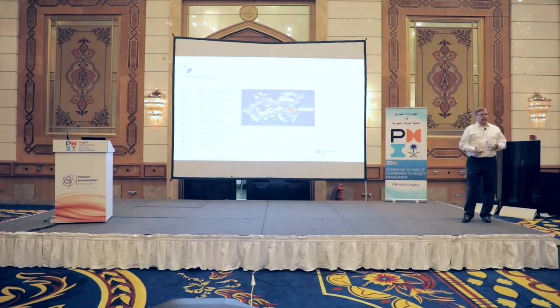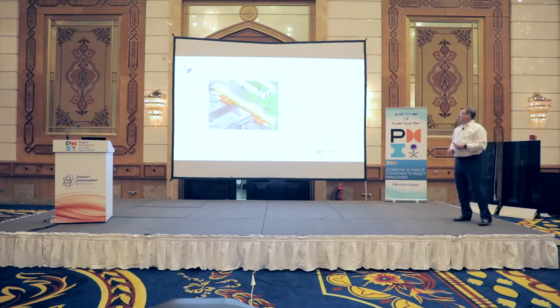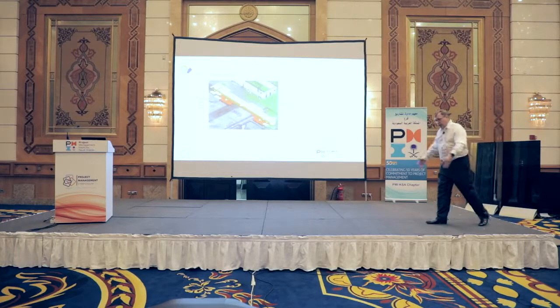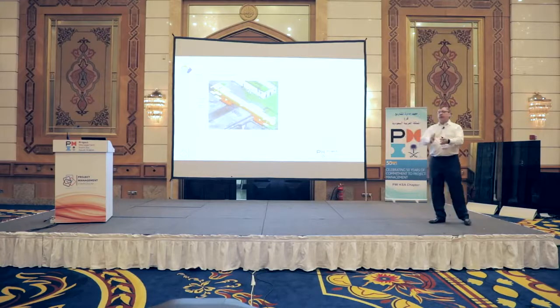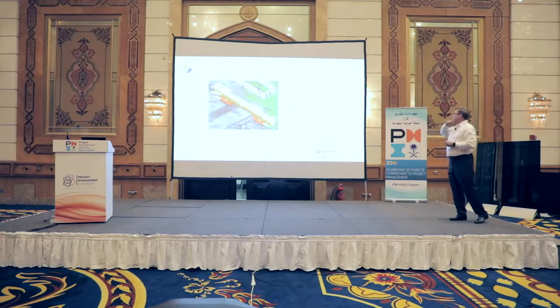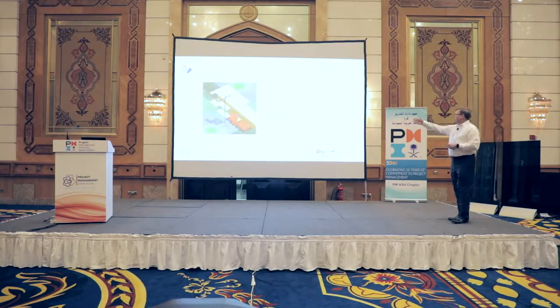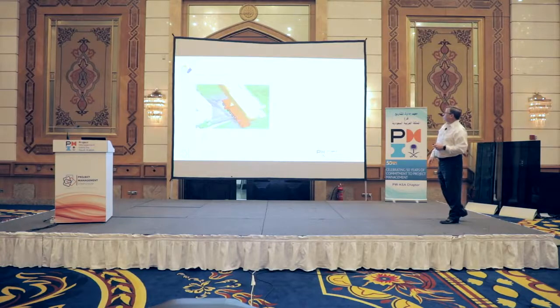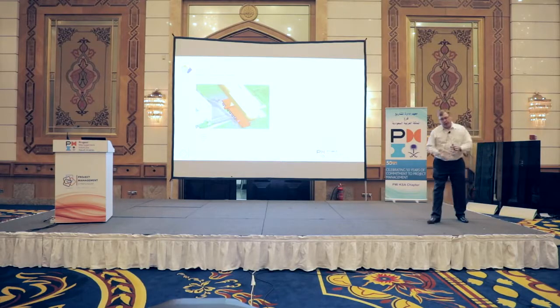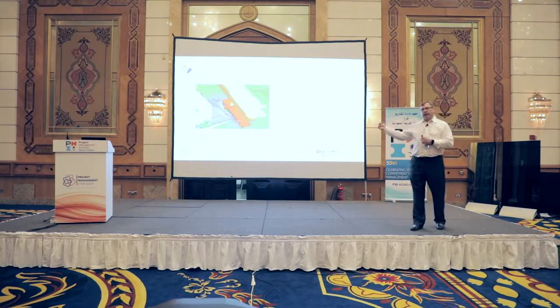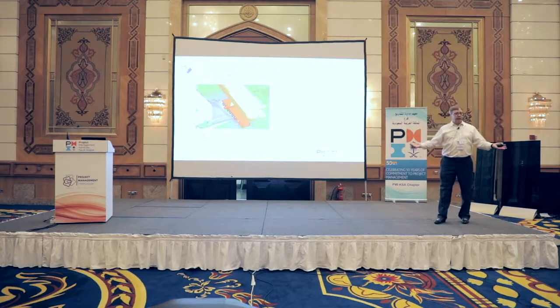Then there are the soft clashes. By putting a radius around the vessel as we move it through the facility, we can now see where we're going to be close to something. So here you can see we have about 2.5 meter clearance between fire hydrants. We have a close clearance between the light poles, close clearance around the stairs. And with this information, we can make a decision. Do we feel confident that we'll be able to move this vessel through and not interface with these things? Or do we be proactive and remove these things from the facility prior to the shutdown?